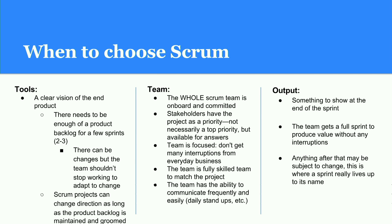When to choose Scrum: the vision has to be clear — where we're going on a long scale, like what is the objective in three or four months. Flexibility along the way is available in Scrum; agile is designed to adapt for that. Teams can make changes but not during the sprint — once the team is in motion during the sprint, just keep going. Changes can come afterwards.